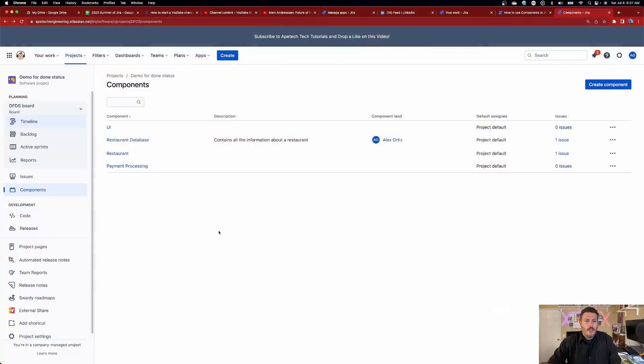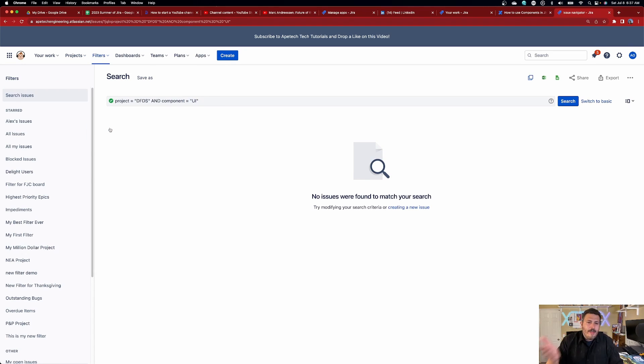So why use components? I use them in two ways. First, when creating a new application and developing new features, components are a great way to visualize how many stories are going to one part of the system versus another, and which part has higher priority. If you're working on an MVP and need to do a demonstration for your client, you look at all your work and say we have limited resources — your product owner can say let's just focus on the UI and fake up a model, and you filter to just UI-based issues.